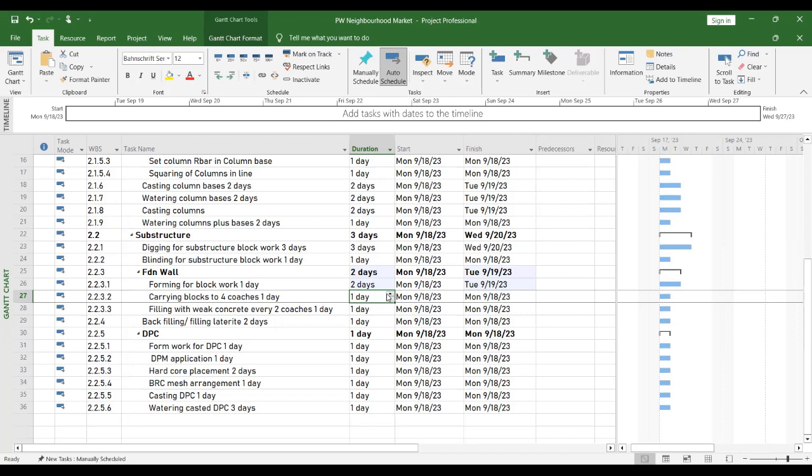80? For just one level now. For just one level. For the forming. Just one block for the forming. So let me assume it can even do 100 times. So that's 400 blocks. And you are sure the forming of one course is no more than 400 blocks. Okay, so let's just do that.